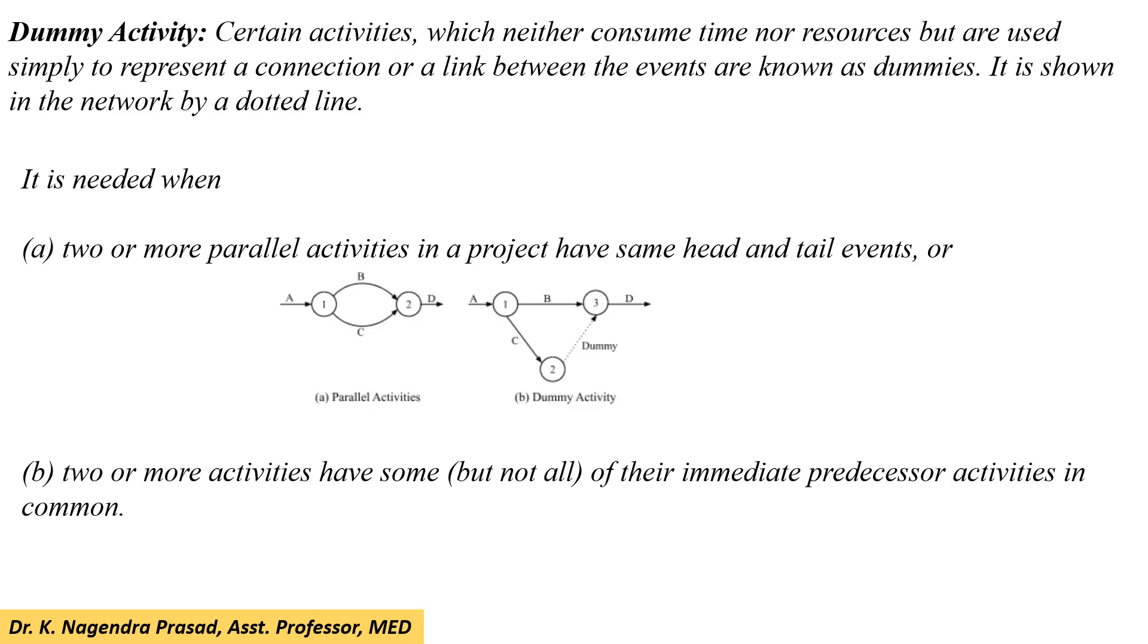Let's see the solution. In the previous lecture, we discussed what is dummy activity and the need for these dummy activities. Certain activities which neither consume time nor resources but are used simply to represent a connection or a link between the events are known as dummy activities. It is shown in the network diagram by a dotted line.